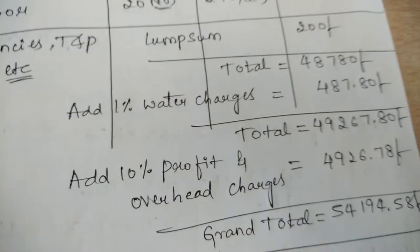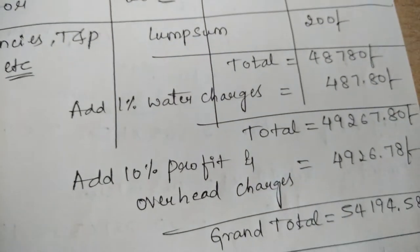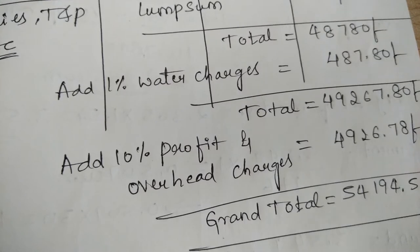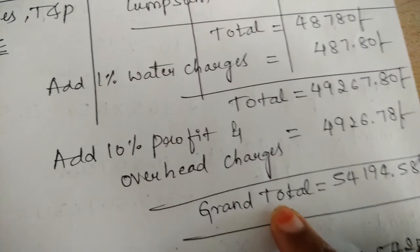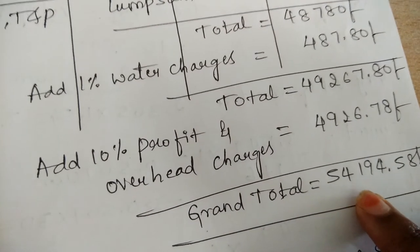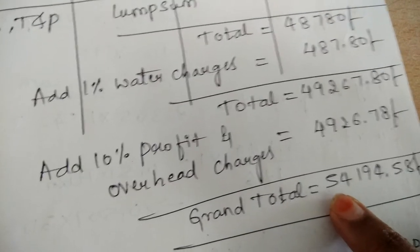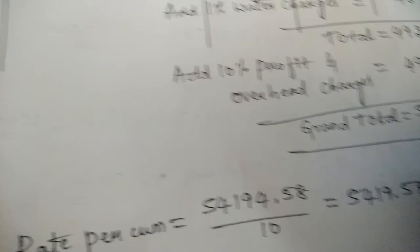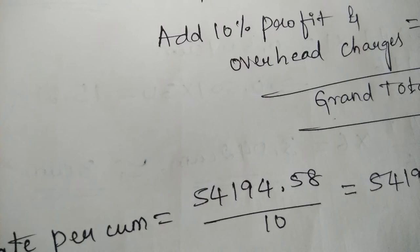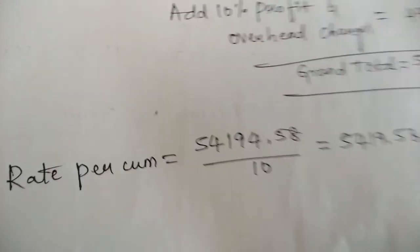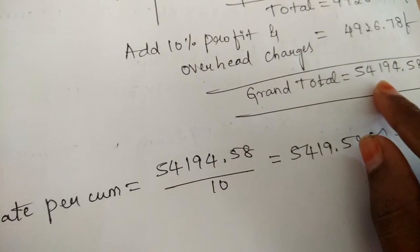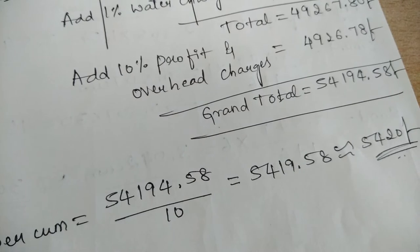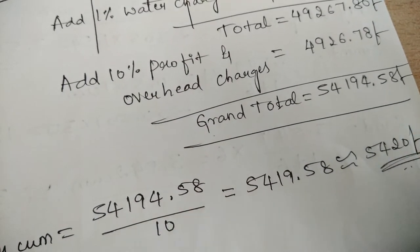That means for 10 cubic meter of volume, constructing a brick masonry work requires a total amount of 54,194 rupees. If you want to find the rate for one cubic meter, divide the total amount by 10. On dividing, you get 5,419 rupees — approximately take the value as 5,420 rupees per cubic meter.